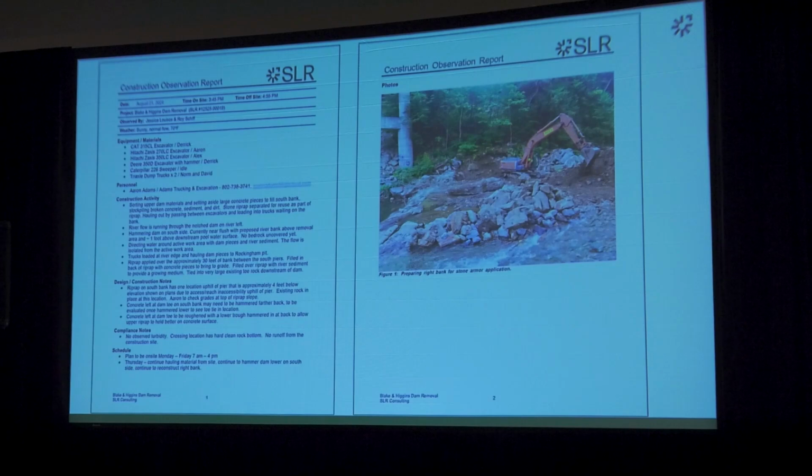And I've got to say, we go back to these a lot to say, this is when this thing was completed. This is when I gave the approval for something. This is when I said, we're going to need a change order, but it's not approved yet. And to be able to kind of circle back on what that communication was. So I know it takes time and sometimes you're tired at the end of a day, but actually having this level of communication is really important.